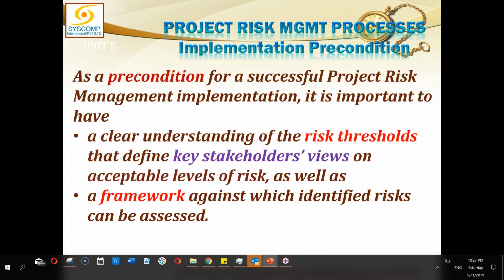So two projects in which two different stakeholders are viewing similar kinds of projects, one has a higher threshold, one has a lower threshold, then the one with lower threshold will have more risks identified. And many risks which are identified in this case will not even be applicable to the other project because that does not come under that threshold. The other threshold is too big.